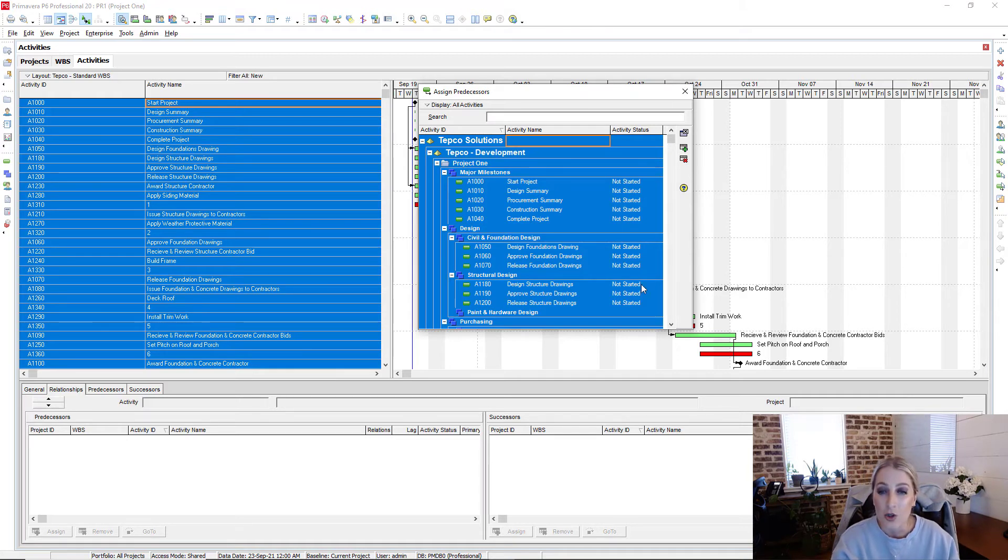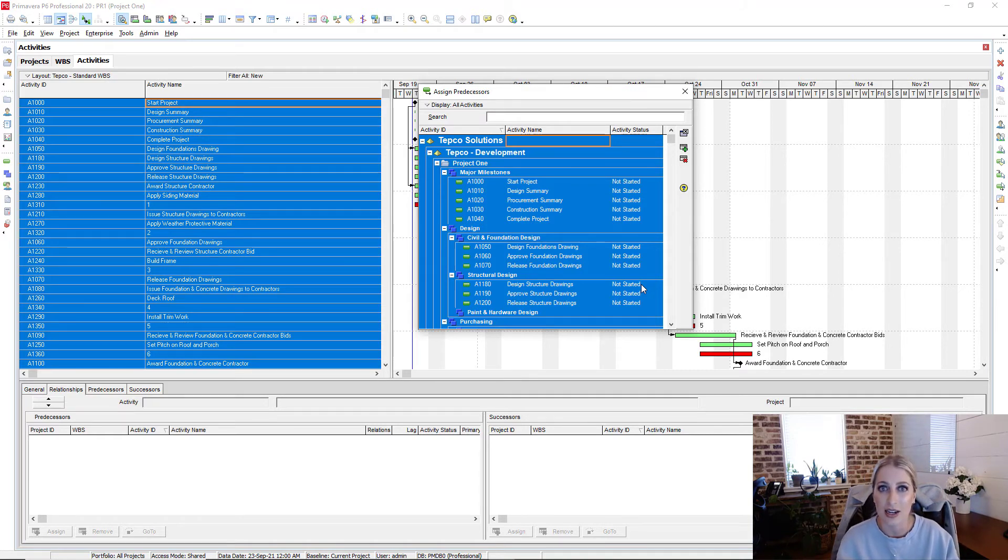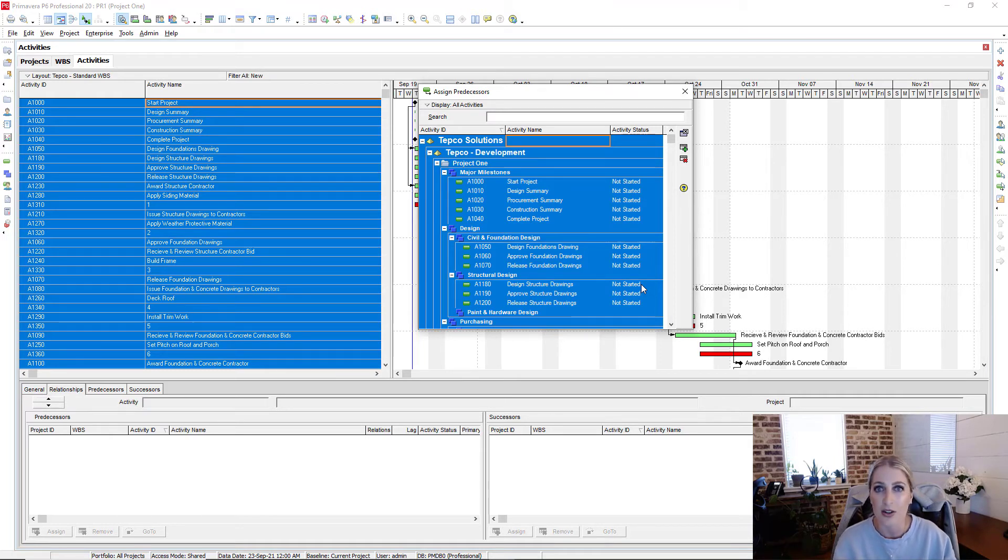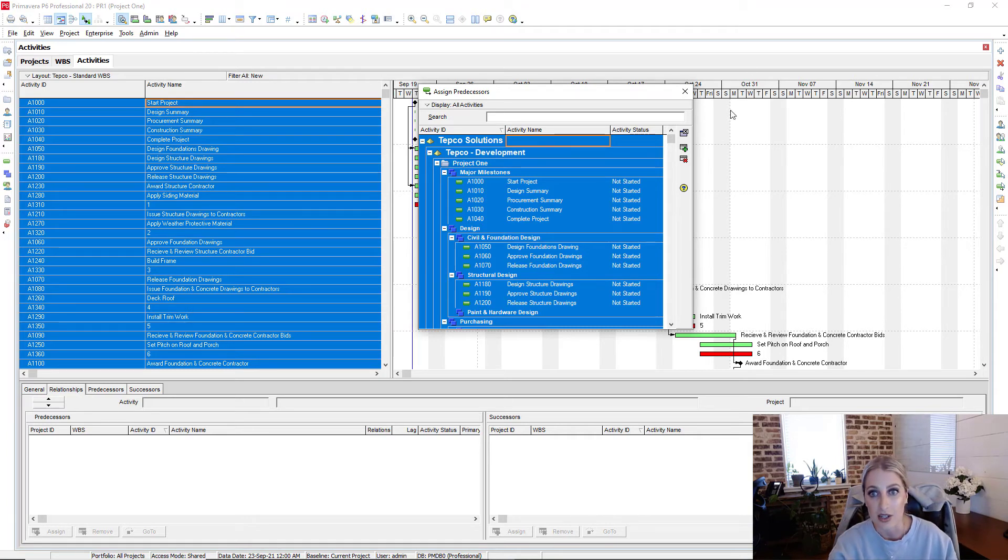Reason being, you might be handed over a project that the relationships on there, it's just a mess. And you'd rather just kind of start from scratch and then tie your own logic and build your own relationships with these activities.